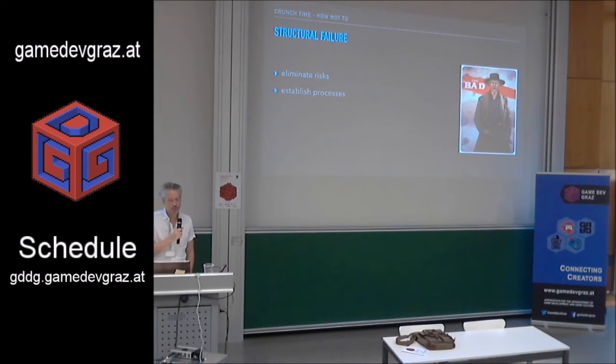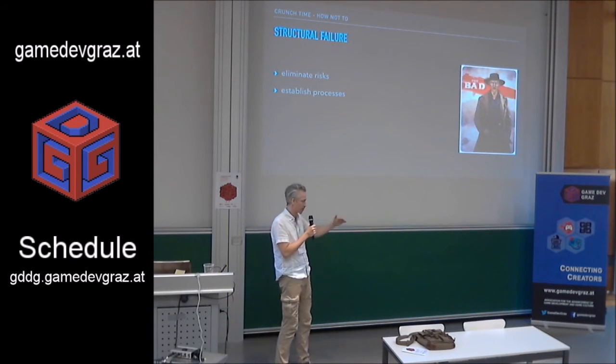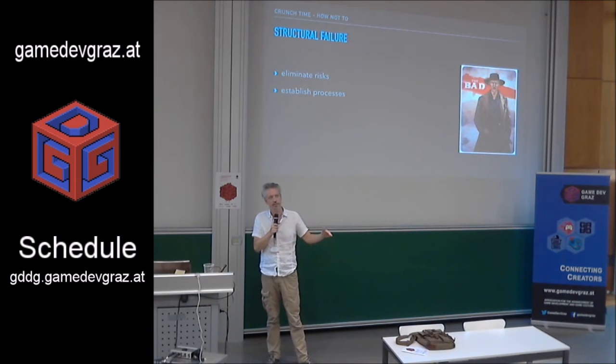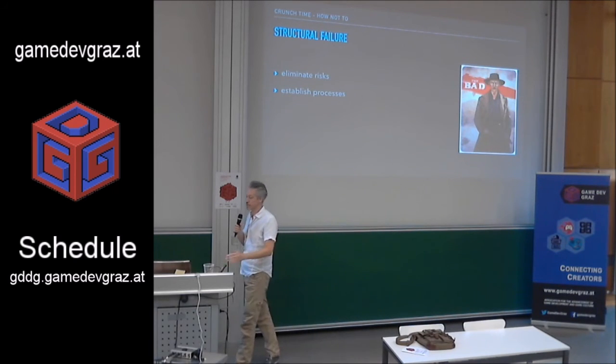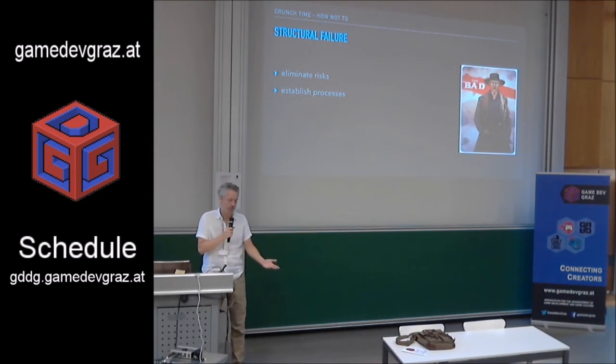And then establish processes. And a process is as simple as writing an Excel sheet. What do I have to do to have a constant outcome of a proper result I want to have? Write your Excel sheets. Another simple thing of a process is how you hand over work. You know, the next guy who has to start with what you produced, how is the interface? How do you hand it over so that the next guy doesn't have to come to you and ask you, and if you're on holiday, he can keep on working.